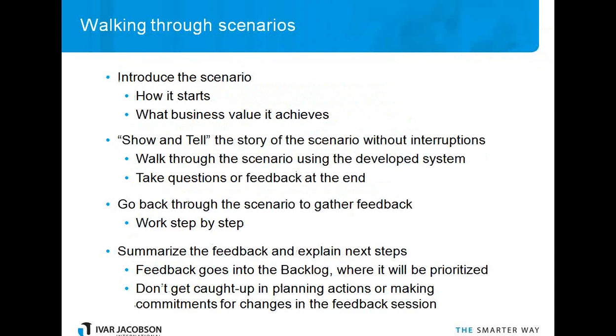So when you're walking through scenarios, there are some techniques that might be helpful. First of all, introduce the scenario, talk about how it starts and what business value it achieves, and then walk through a show and tell of the scenario, trying to paint a little story around how somebody is using the system, and then take questions or feedback at the end.